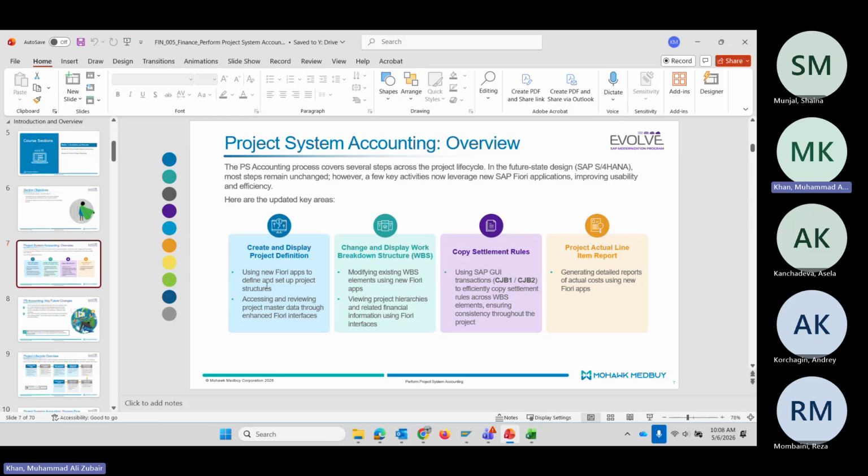Say, for example, MGS has one project in Coxwell. The top one is the Coxwell hospital, the project definition, and underneath there are different levels of work going on, like construction or renovation. Broadly, we have two under one project: renovation or building a new building construction. Underneath, again, you can make more.